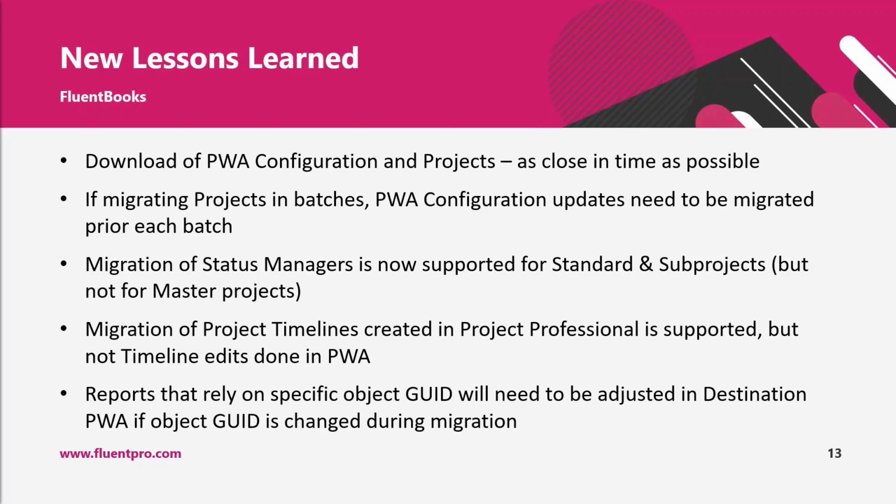discrepancies in project schedules. So to prevent these discrepancies, we performed download of PWA configuration and batch of projects over the weekend when users are not working with their projects. So this helped us to ensure that calendar exceptions were as equal as possible in resources and projects.